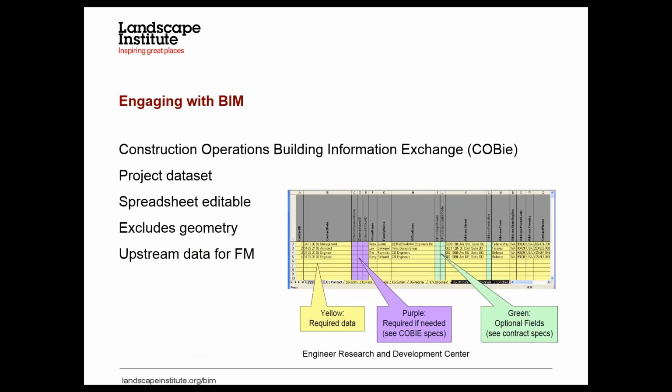There's a lot of discussion about the deliverables of BIM. One of the big ones that gets bandied about a lot is COBie, which stands for Construction Operations Building Information Exchange. So it's data that can be used for the construction or built up over the construction phase, but used in the operations phase of a building, facilities management moving forward. So it's really providing data in a format that can be used in facilities management.